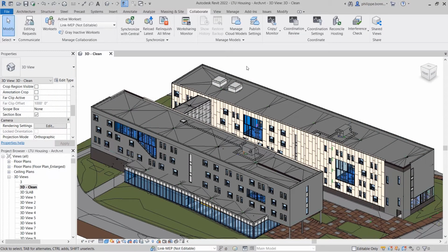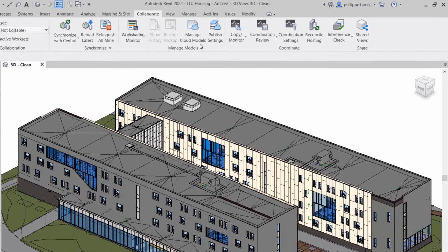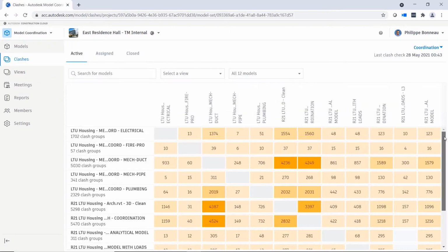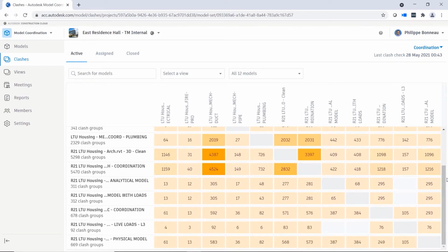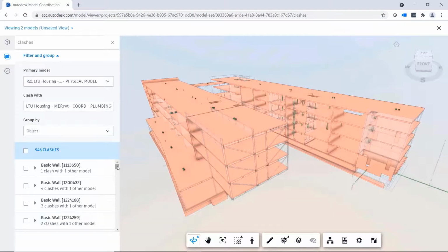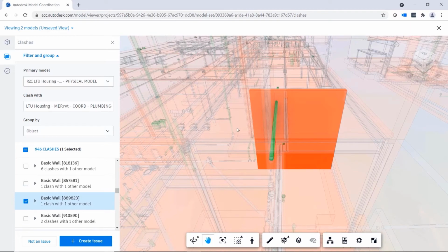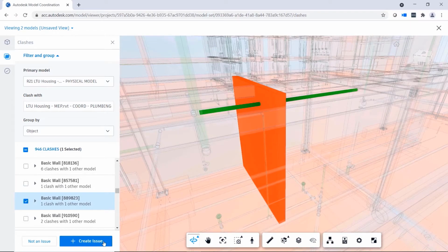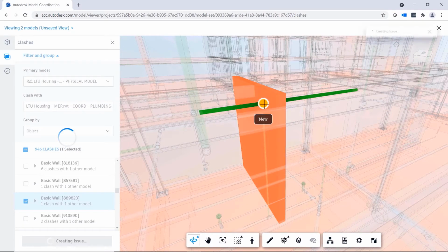Using Revit, BIM Collaborate Pro, and Navisworks, design and pre-construction professionals can streamline their BIM coordination processes. Before a construction project breaks ground, it is important to identify and resolve clash and constructability issues. In the Model Coordination module, included in both BIM Collaborate and BIM Collaborate Pro, automated clash detection features help you quickly identify coordination issues for models hosted on Autodesk Docs, enabling your project stakeholders to view, manage, and resolve model conflicts.